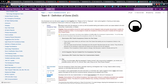Let me just go over some of the things — after discussing with the team during retros and some things that I came up with too — kind of what I'm expecting, and then maybe we can disagree or agree. So: developer works with QA assigned to come up with all possible testing permutations and/or use cases related to the item being fixed, implemented, or created.